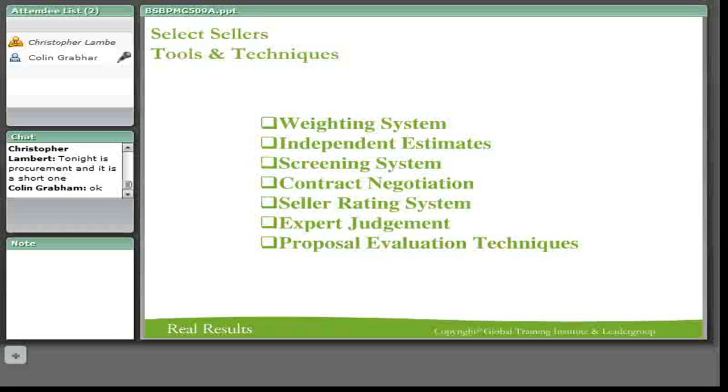So what you would do there is get somebody from outside to do the estimate, and then you would go out to tender with those estimates. And so you mitigate the risk of the vendor trying to cut corners to make the price fit, or to overestimate.